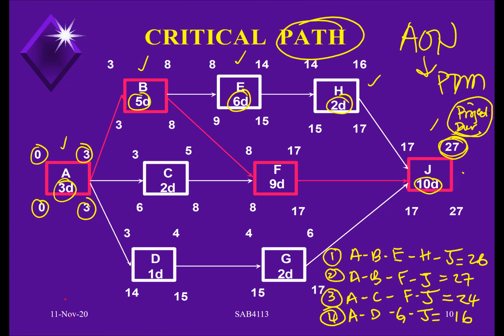But if your calendar of work requires that every Sunday is a non-working day, then you will know what would be the date after 27 days from tomorrow. That is the answer that we want. So if you can answer those things, then that will be the only one answer.